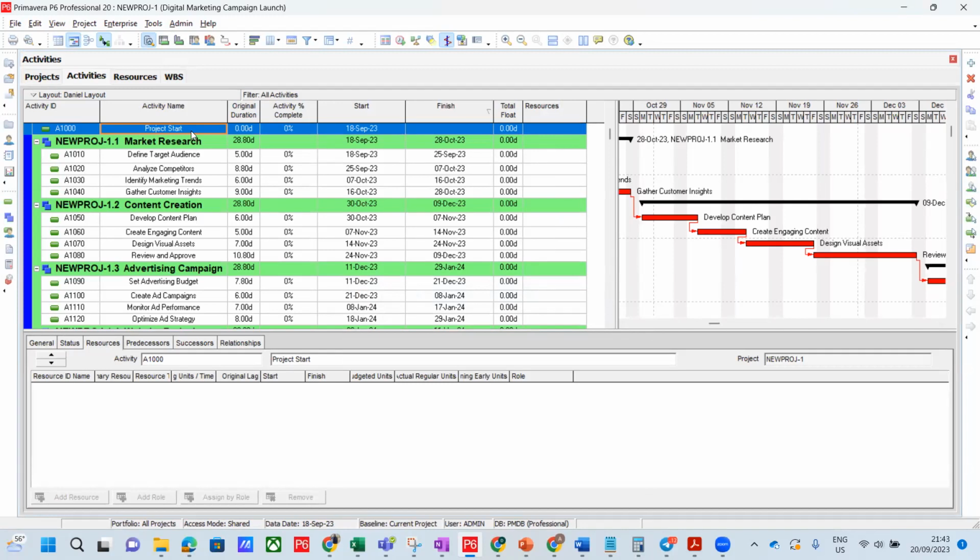And remember, it's another project, another interview question. I have a milestone and I have two resources. How do I add a resource to a milestone in Primavera? Your answer is as good as said: you cannot add a resource to a milestone. A milestone will not accept a resource because it's not doing anything. Its duration is 0. So you cannot assign a resource to a milestone. So that is the answer.